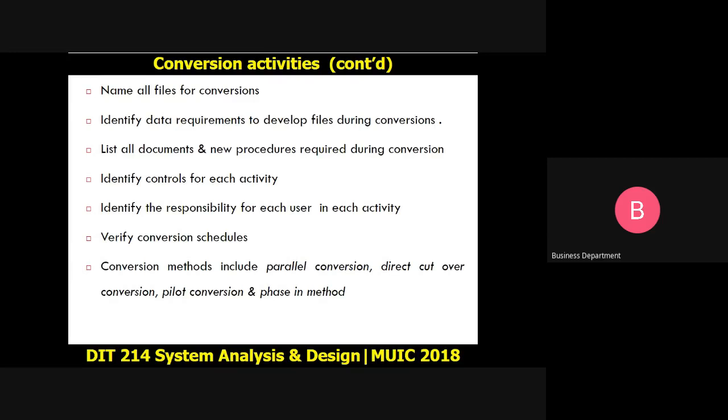And lastly, we have the phased-in method. As the name suggests, it means that you do have a complete system, but this system will not be deployed entirely as one. So maybe you can just, for example, pick the system and say, we shall start with the component in finance. Let's see how this component works in finance. If you are okay with the component at finance, we now go into registry. If you are okay with registry, we go to library and so on and so on.